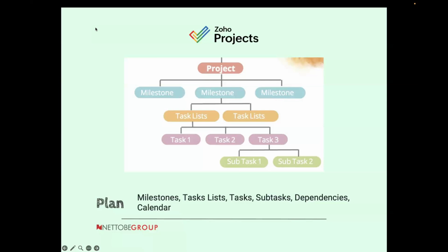Because let's say you break down a project into tasks of at least one week, if there are issues within it within 2 or 3 days and you don't catch it, that's already a breeding ground for delays and other risks that you might not have caught on. So basically, that's how it's suggested that you should break it down.